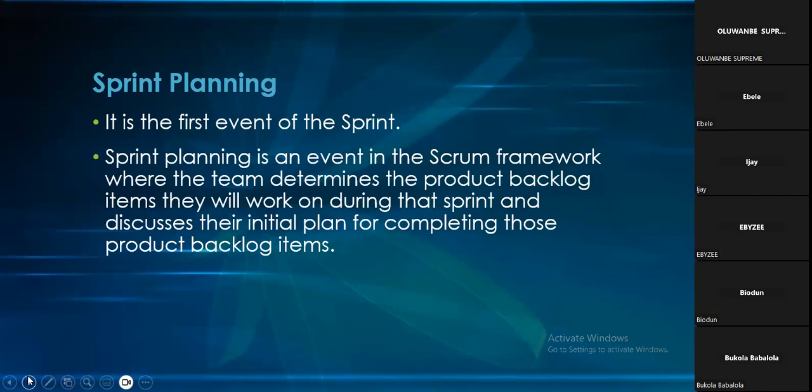Now, we want to go into a sprint. So when we want to go into a sprint, we come to do sprint planning, which is this planning that we're looking at now. In the sprint planning, we sit down according to priority that we're going to get from the PO. We'll pick the things that we think are relevant for us to work on in the sprint. Listen to the word sprint backlog. So when we pick the things, from those 20 things, we might pick only 4 things that we want to work on in this iteration, in this sprint.